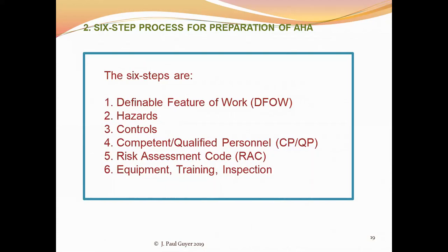And it is a good idea, as I indicated, not all of the versions of this form necessarily have this feature printed on them, but I think it's a good approach to blend together the risk assessment codes for the individual job steps into a single risk assessment code for the task. It just helps everybody to focus their thinking. These are the potentially hazardous tasks, and so we need to pay attention.